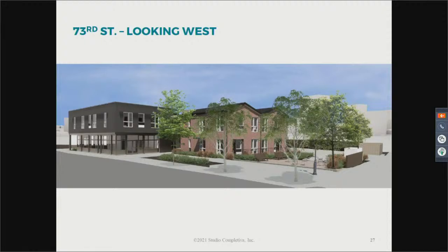Just Arturo here. With the demo scheduled to be done at the end of June, we hope to break ground later this fall. We have a number of steps to move forward to get to that point, but our goal is to try to break ground this fall. And move-in date of? Thanks for the comment. We haven't gotten that far. We're still in schematic design at this point.